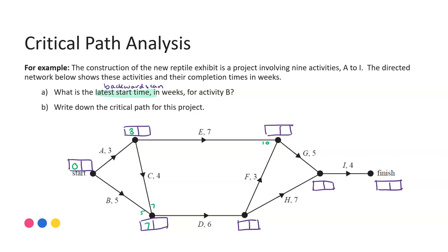7 plus 6 for D would be 13. And so activity F: 13 plus 3 gives me 16. The largest value moving forward - G can commence when both are done, giving me 16. For G: 16 plus 5 = 21. Considering H coming in here: 13 plus 7 = 20 for activity H. 21 is the largest value, and so I can commence. 21 plus 4 gives me 25 weeks at my finish point.